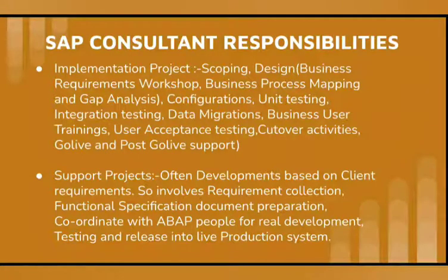The design phase is generally where the consultants conduct workshops and discuss with the business users and various other business people who are required. In the workshop, the processes will be covered and discussed in a detailed way, along with the business process requirements. The output of the workshop is a document covering the existing process as is, and to be, which is what we generally need to follow.